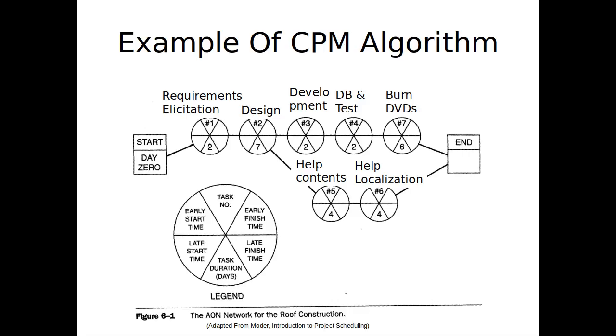There are times we have it imposed from outside, but we're assuming here that we're interested in scheduling where the latest time for the deliverable is dictated by the activities to be done before. So it's 19. And when's the latest that this guy could finish in this lower branch? When's the latest it could finish without delaying the whole thing? 19. So ladies and gentlemen, if it doesn't finish at 17, it's not a big deal. If it finishes at day 18, it's fine as well. Finishes at day 19, it's fine. It still hasn't delayed anything because this thing is still going on up here.